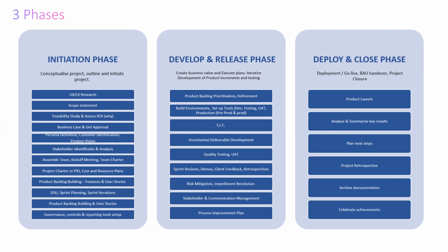You must set a target. After you've set a target, you later want to check, did we meet the target or not? That's what you want to do there. But if you've done your business case or your charter, you would have put in some sort of metrics to indicate that the product you've launched meets certain criteria for return on your investment. So you could be analyzing those after you've launched. You would analyze whether the product is performing as expected before you finally close off, in case you have to capture anything else to hand over to another project, perhaps.